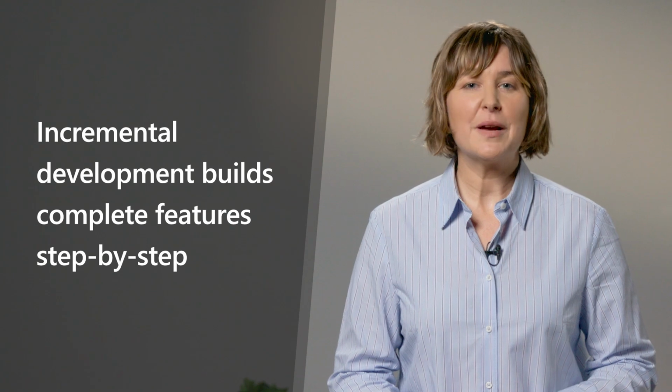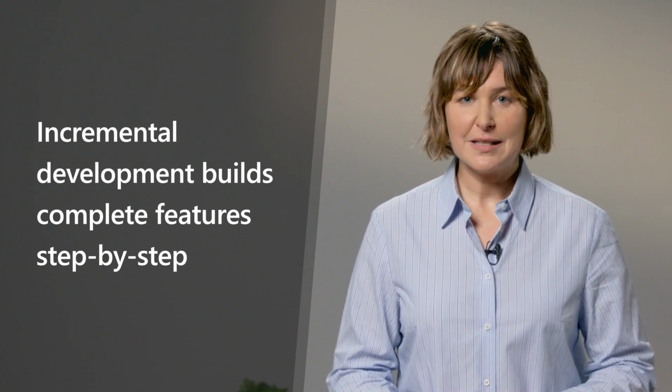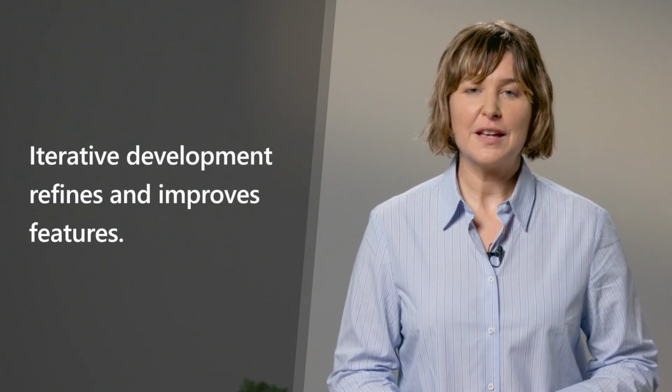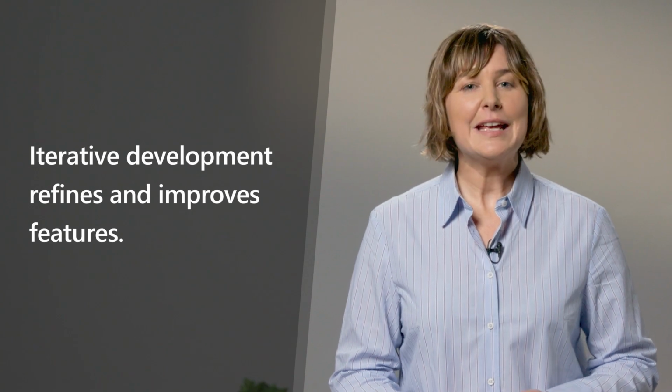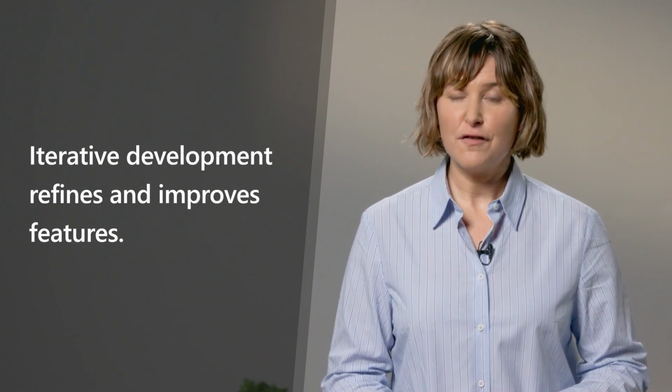Something to remember is that incremental and iterative life cycles are often confused. In incremental development, the focus is on building new features step by step. Each increment is a complete, usable product in incremental development. On the other hand, iterative development is about refining and improving existing features. In iterative development, each iteration aims to enhance and perfect the product. You can also combine a predictive waterfall approach with Agile.